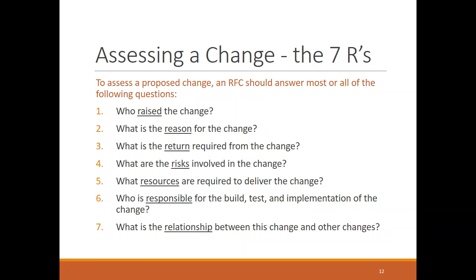That's going to determine in the hierarchy of the organization, where is this request coming from? Because obviously the higher that source is in the organization, the greater authority they're going to have. The reason for the change: is it a systemic thing or is it sort of trivial? The return required from the change. When we talk about return there, they're talking about money.